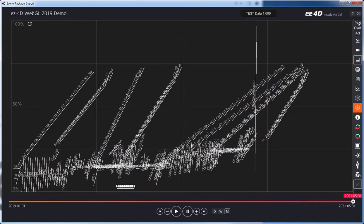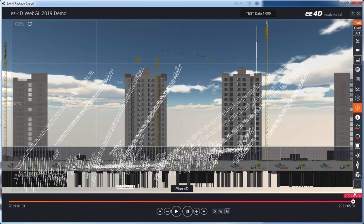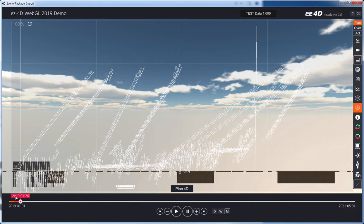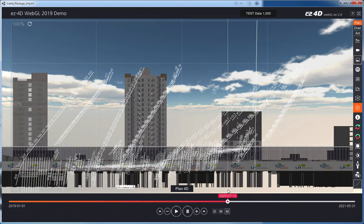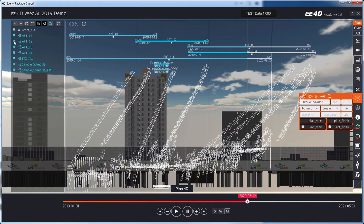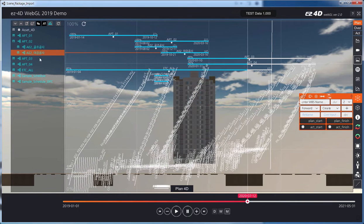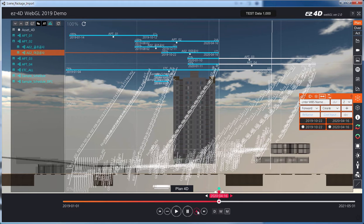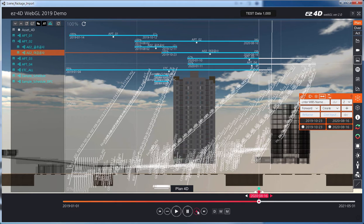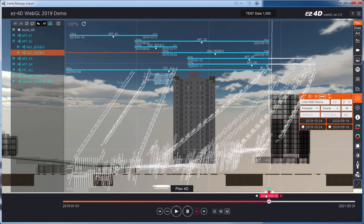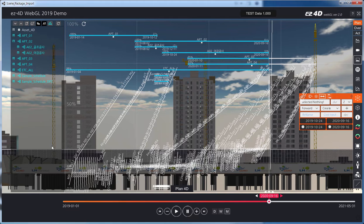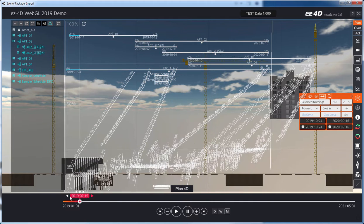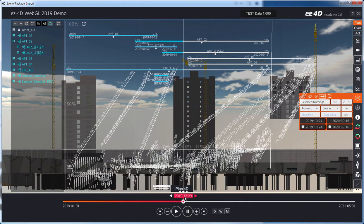Easy 4D supports LOB schedule together with CPM schedule to provide a single view of entire WBS standard progress at the required level of a building. LOB schedule can be modified easily, and the modified schedule plan is reflected on the CPM schedule in real-time.